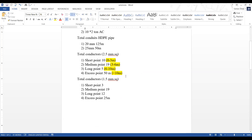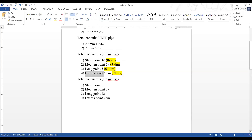There are two conductors that are going to be used in that building: 2.5mm² and 1.5mm². Whenever you're preparing the bill of quantities for the conductors, especially the sub-circuit wirings, the measurement is done using a point system. You have a short point, a medium point, a long point, and an axis length - also called an axis point. To qualify as a short point, the length of the conductor should be between 0 to 3 meters.